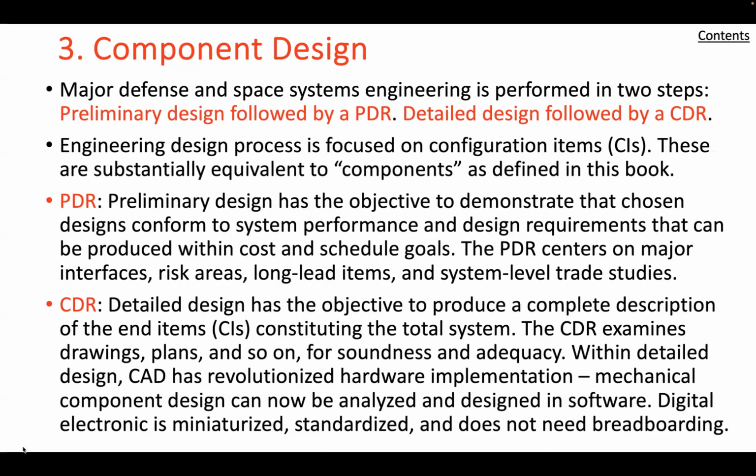Typical products of preliminary design include design and interface specifications, supporting design and effectiveness trade studies, mockups, models, and breadboards, interface designs, software top-level design, development, integration, and verification test plans, engineering specialty studies. So major system engineering inputs and review are essential for all of the above items.